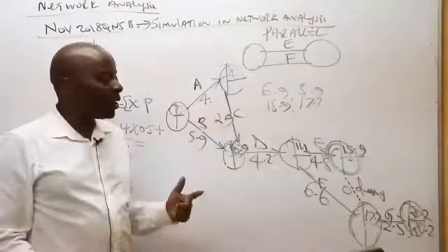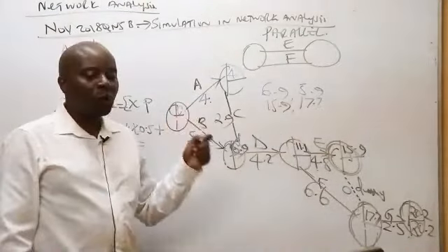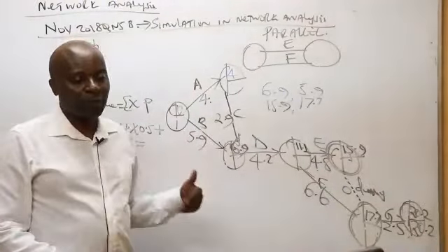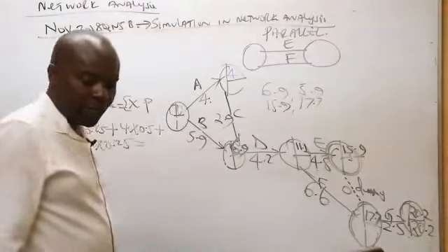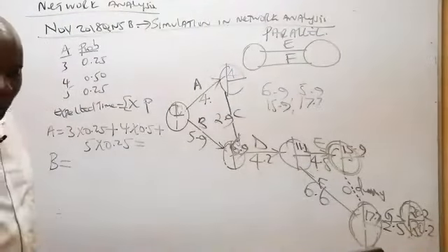Now it's the backward pass. You move right away from there up to the end, where we shall be able to get a 0. With 20.2, you keep on subtracting backwards until we get a 0.